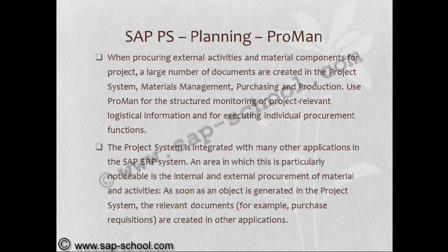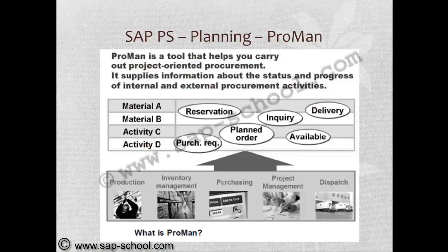The project system is integrated with many other applications in the SAP ERP system. An area in which this is particularly noticeable is the internal and external procurement of material and activities. As soon as an object is generated in the project system, the relevant documents are created in other applications as well. So ProMan is a tool that helps you carry out project-oriented procurement.